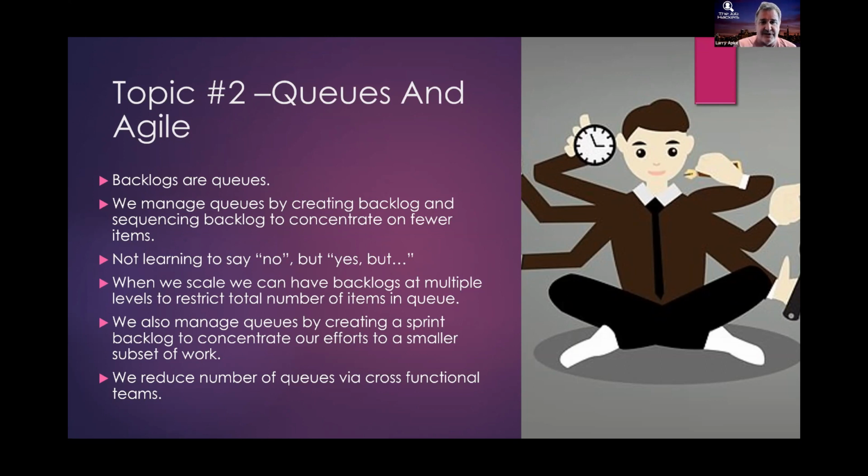And because I have an understanding of velocity and sequence, it's probably going to be about 10 months before we would even get to it. But I'm guessing that in that intervening 10 months, there's going to be more important work. So the odds of you getting it in the next year are pretty slim. Do you still want me to put it on the backlog? Answer is yes, fine. I'll put it on the backlog, right? You with me on that? Pretty simple concept. Don't tell people no. They don't like it. It's almost like the concept of, what is it, improv? You know, improv with comedy.